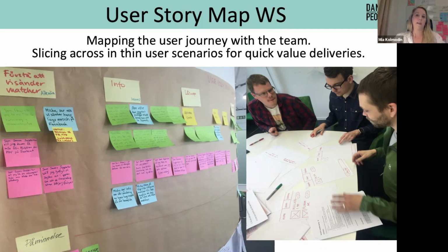So you keep the same plan and nothing gets lost, because what you have underneath the line is still going to stay there. And if you slice something and make it smaller, because maybe you define that we're just going to use 1 payment method instead of all of them. We define maybe Visa, not PayPal, not Swish, or what we have in Sweden and other countries, different ways of paying. We might say we only want to use Visa.